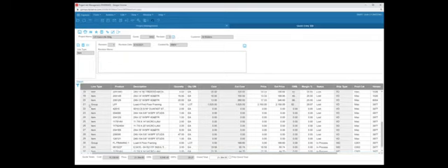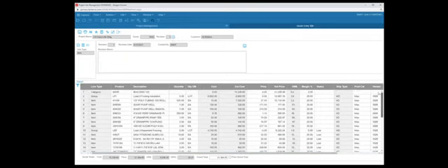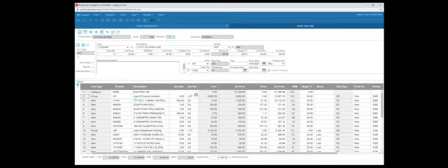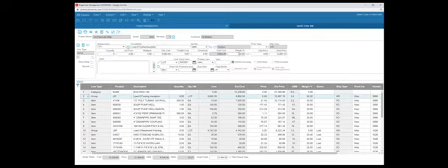And then I can actually go and sweep down on each one of these groups. If I wanted to go to this group and make a margin of 35% or 25%, I could sweep down and it'll change all that group to 25% and automatically fix my pricing for me. I can do the same thing at the category level.